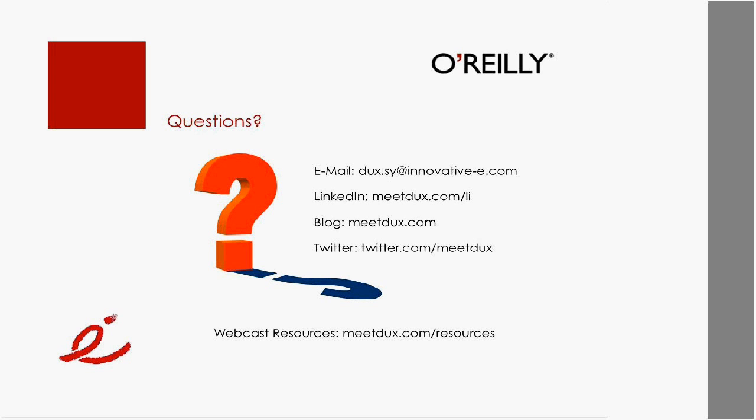There's a tool I use called Project Publisher. Go to projectpublisher.com. The beauty of this tool is that it integrates with Microsoft Project. So if you already have a Microsoft Project schedule with your resource information, it ports it out to your SharePoint site and synchronizes with that. So in short, it shows you all the resource information as well.